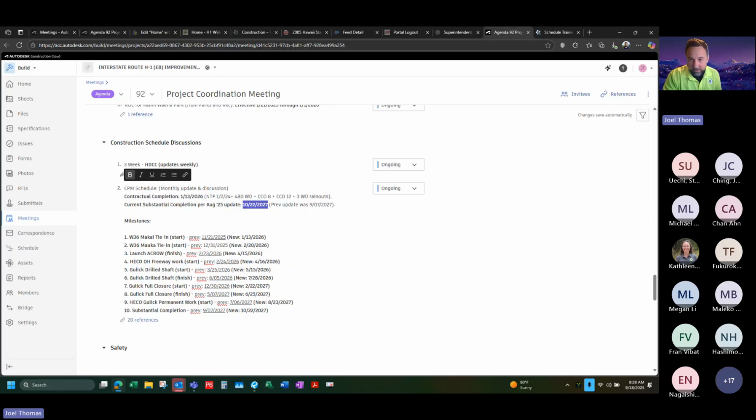Oh, sorry, last one I see here. Can't we withhold payment for no schedule submittals? I think you can if you're not getting an updated schedule. I'd have to read up on the spec on that, but that does sound about right. I know City and County has that, and I think at HART they had that. So I want to say at HDOT we do have that as well.